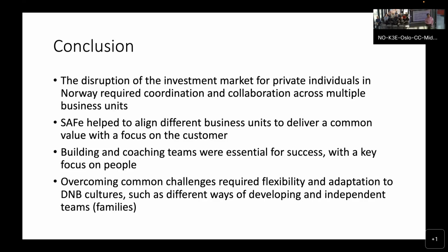Firstly, I hate big teams. Big teams require a lot of overhead to manage. Scrum teams are supposed to be, according to SAFe, 7 plus or minus 2, plus Scrum Master and Product Owner, so you can go from 5 to 11. But if you want an autonomous team, you don't need to go to the max of the size. You have 5, 6 people, you say it is one team.